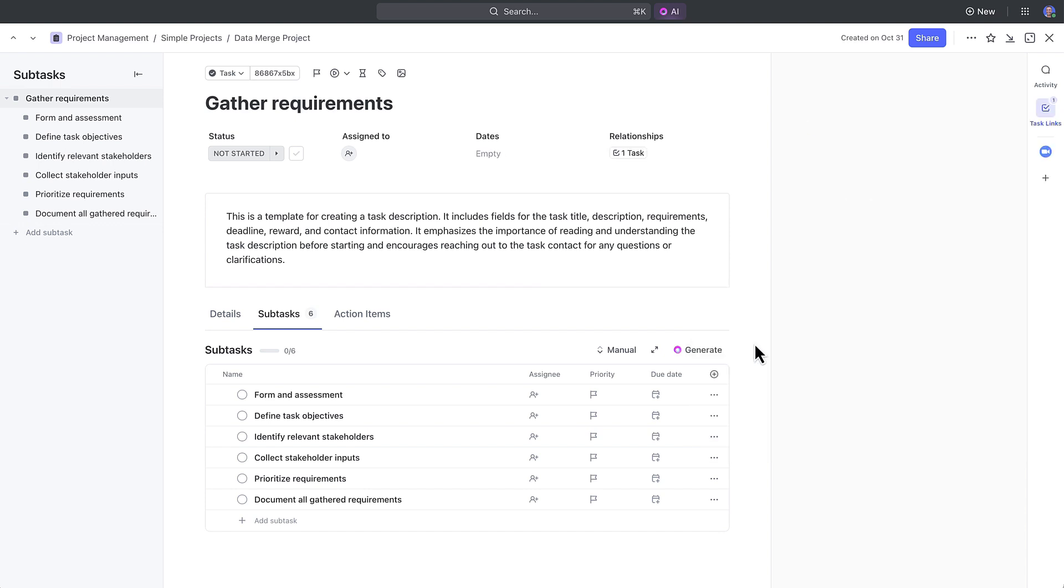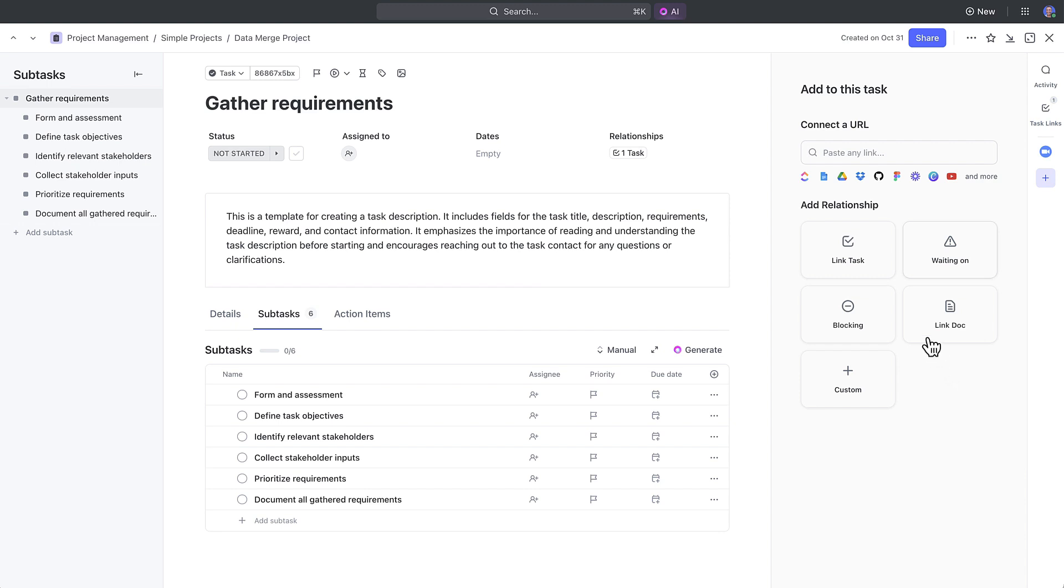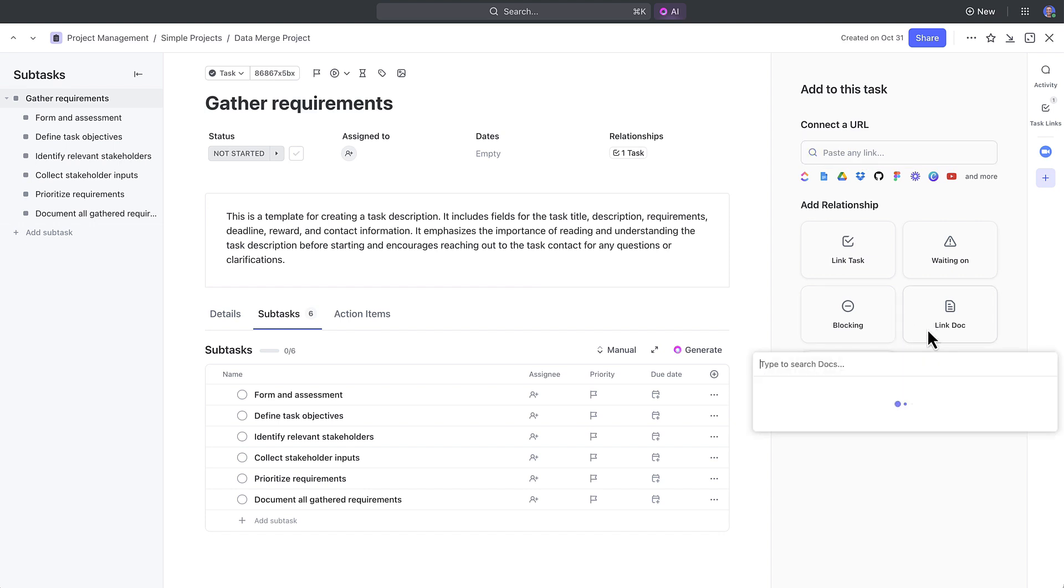In the relationships panel, you can also add a URL. You can link tasks. You can set dependencies such as waiting on or blocking dependencies. Or you can link docs.